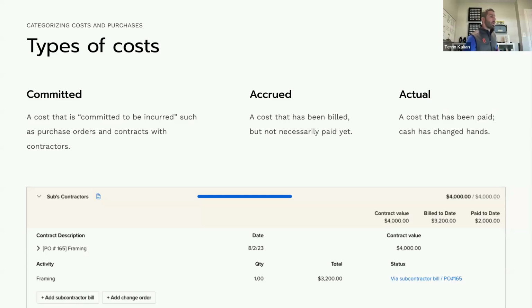And this is handy with situations like purchase orders, because if I buy $10,000 worth of materials via purchase order, it might even just be a phone call. I call up the vendor, they say absolutely, and they start their process of sending the materials to me. Now, technically, I haven't spent any money yet. They haven't sent me a bill yet, but I want to understand that, yes, that money is going to be spent. We already have ordered the materials, so we have committed to spending this money.